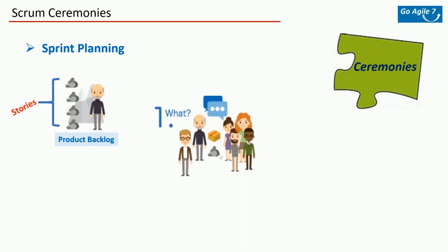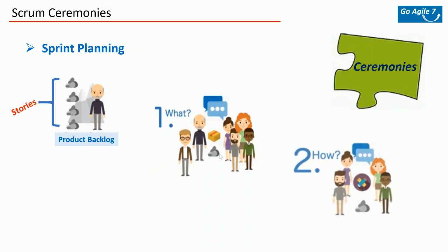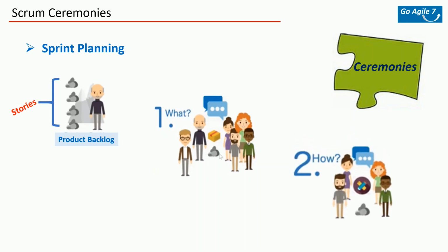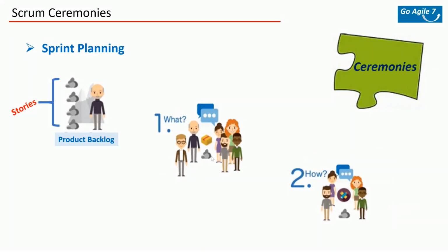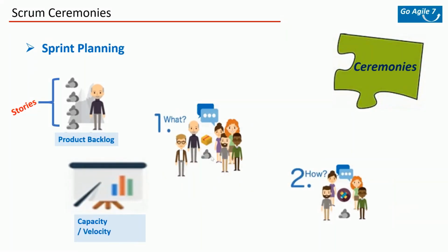There are 4 key elements of a sprint planning ceremony. Define the scope of the sprint. Basically, you will determine which tasks in the project backlog your team intends to tackle during the particular sprint, who is available to work on them, and assess your team's current work capacity. That means you are factoring in all the holidays, events, or days off. So every member should inform upfront if they are taking any days off or any leaves during the sprint. Accordingly, the Scrum Master can do some sort of capacity planning.